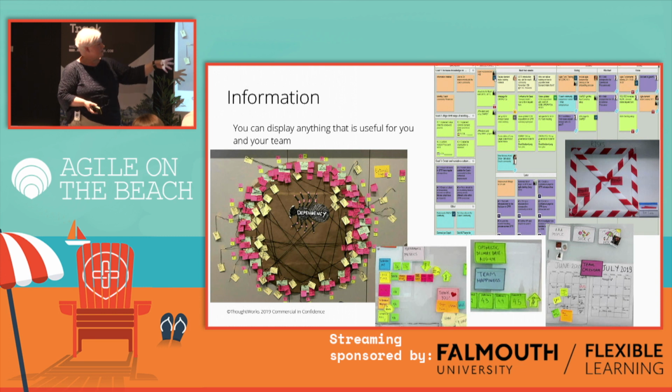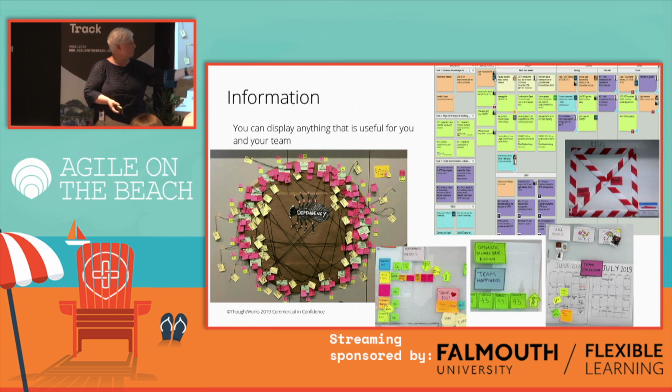And at the bottom here, we've got some examples from my previous client's delivery wall. So we've got some team metrics. What are we measuring as a team? What's our baseline and where are we measuring from? We've got a team happiness score so that we can take a trend, because this was for a team that we were working with the client as a co-source team. So we wanted to deliver some software, but we also wanted to enable them and work with them, pairing with them to do that. So we really were very interested in the team happiness. And an optimistic delivery date. So not one set in stone, but one that we're shooting for.